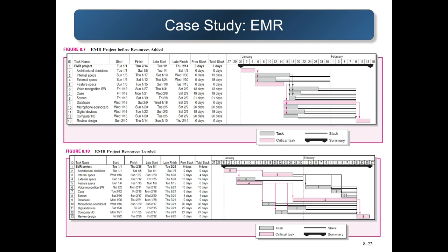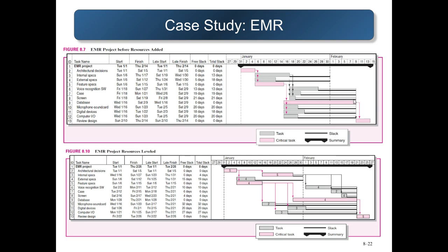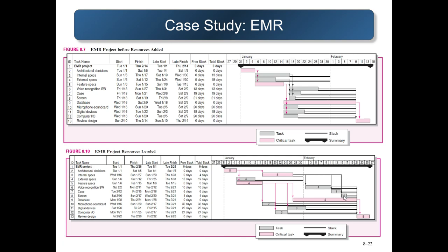So with this graphical summary, please take note that the slack was minimized. We now have this minimal slack compared to this long slack. So slack was minimized in consideration of limited resources, in effect delaying some activities as well. So this one, delayed for a couple of days, means the critical path will be changed, as seen on the project network slide.